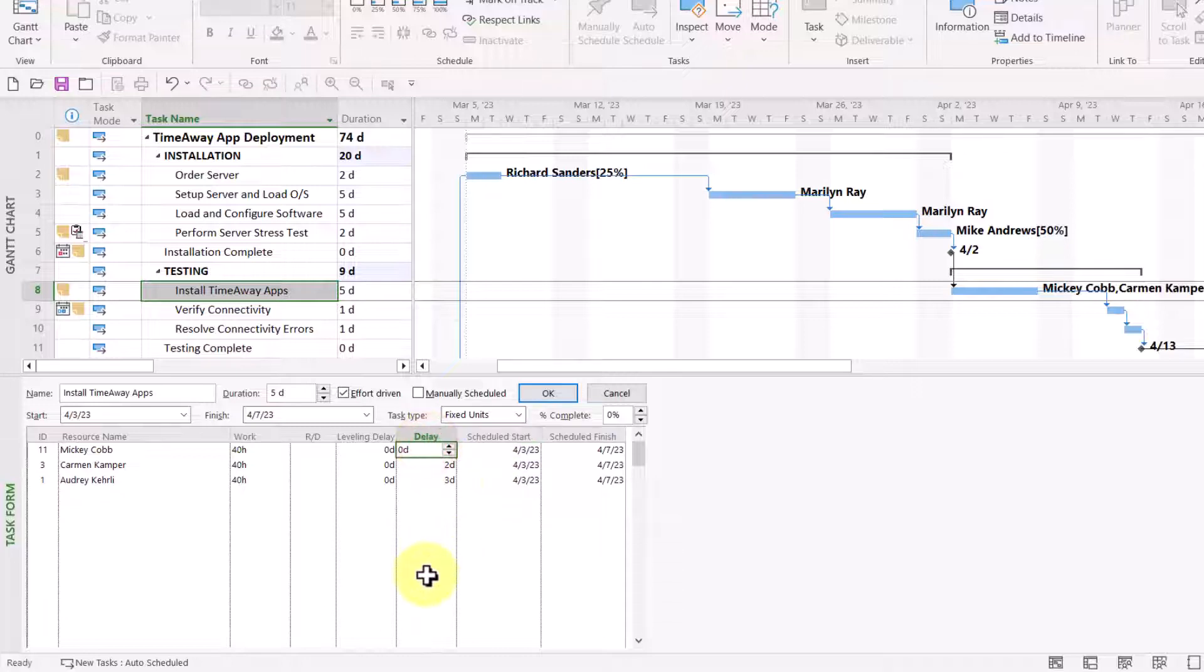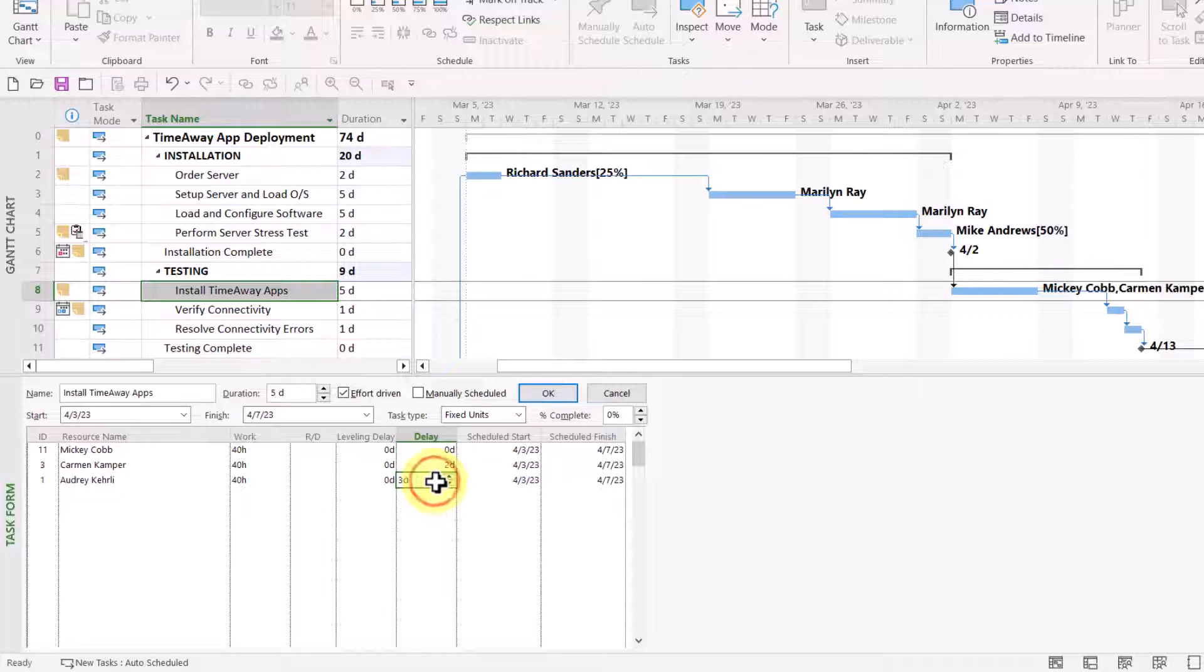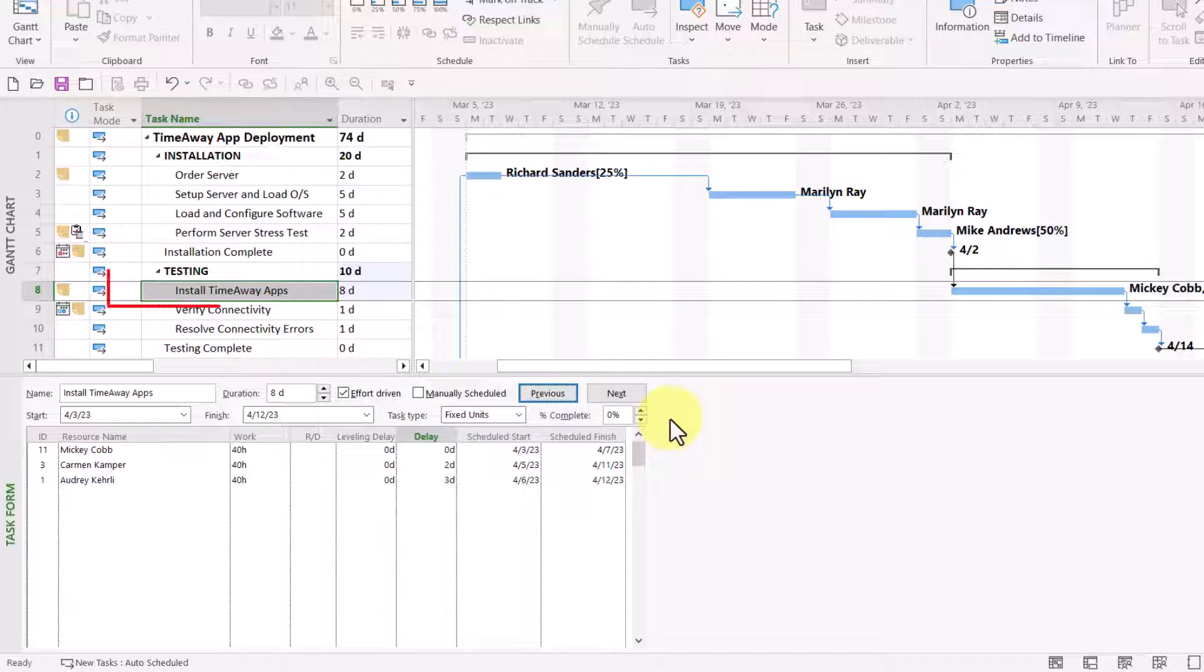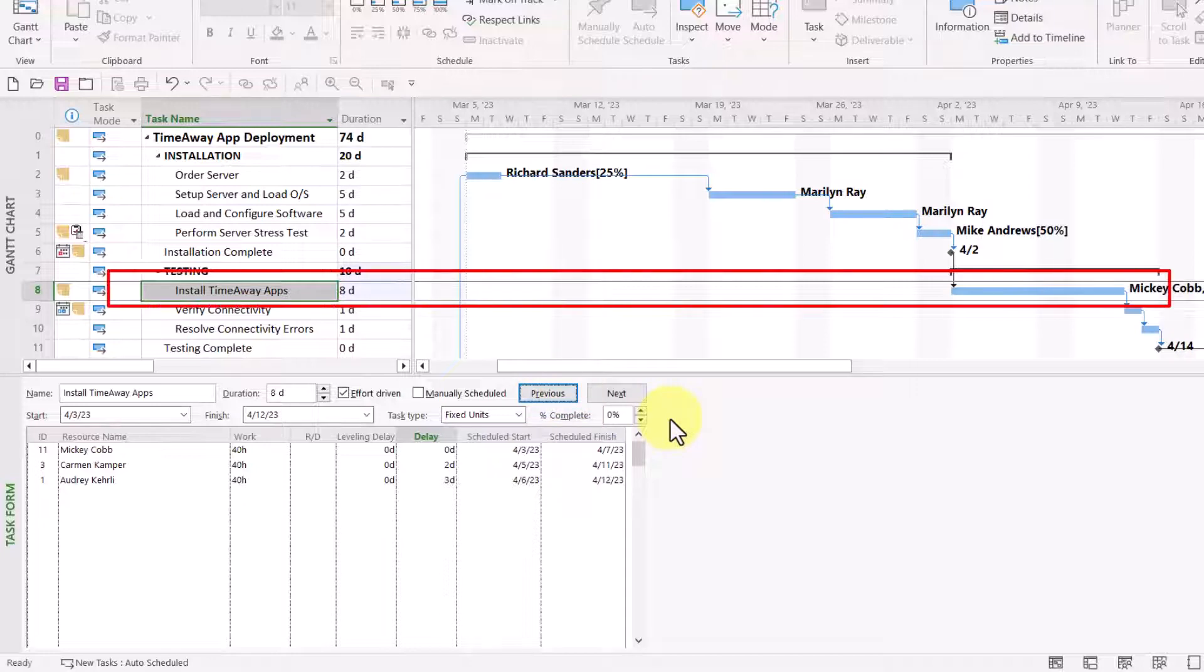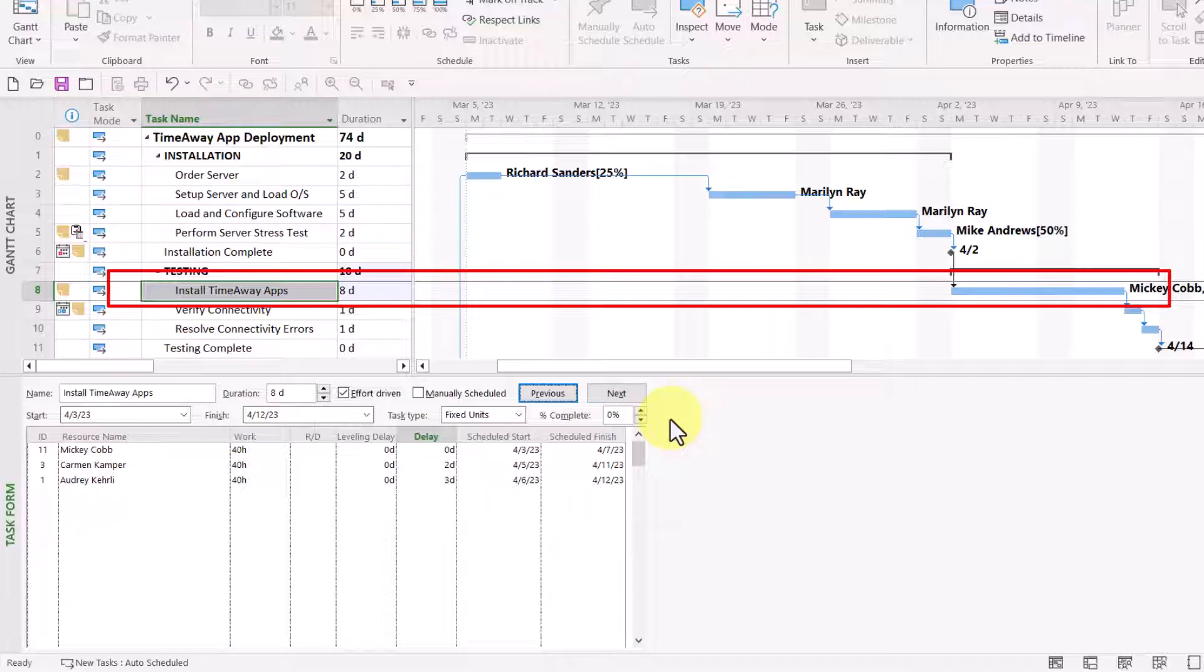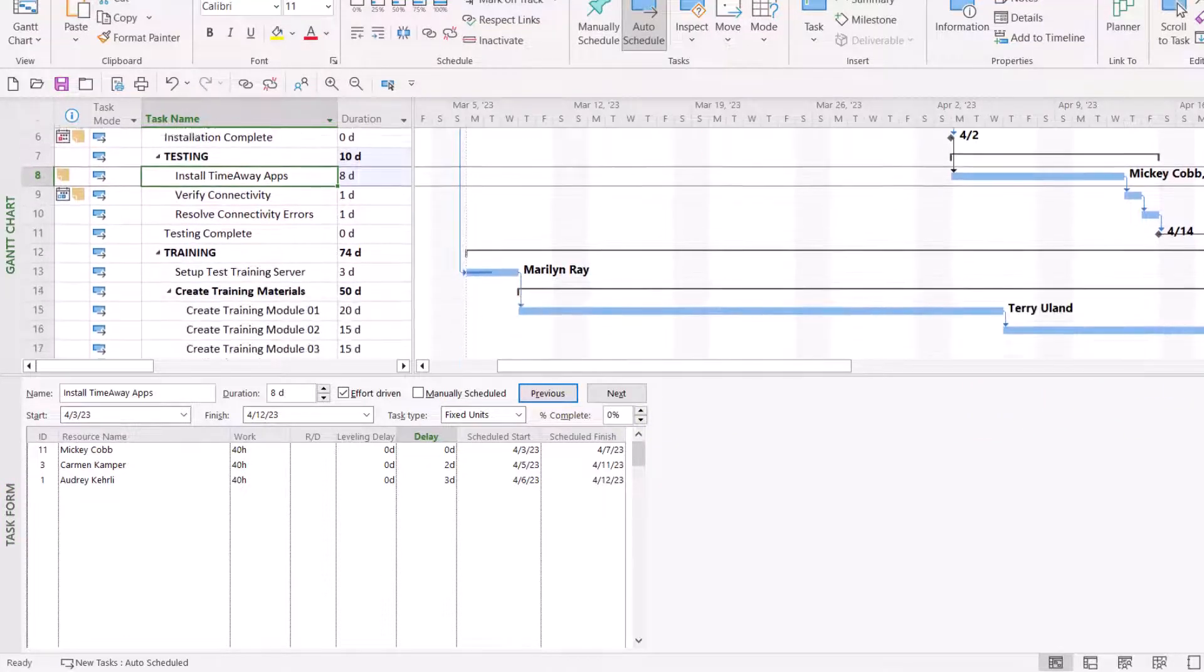So, here's the way it'll work. Mickey will start on day one. Two days later, Carmen will start. Three days later, Audrey will start. And when I click the OK button, Microsoft Project will reschedule the work for each of the resources so that their schedule matches the delays that I entered. And Microsoft Project will also recalculate the duration from five days to eight days to account for the delays that are taking place.